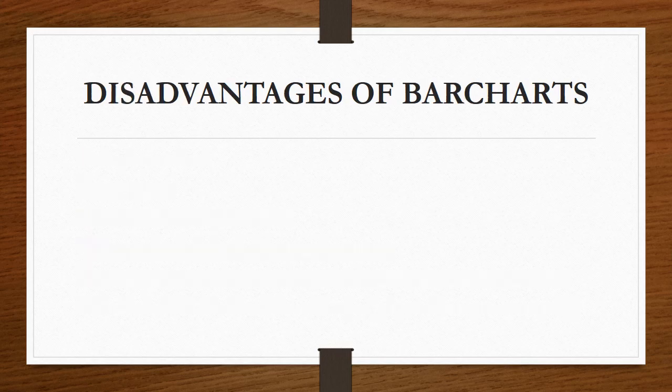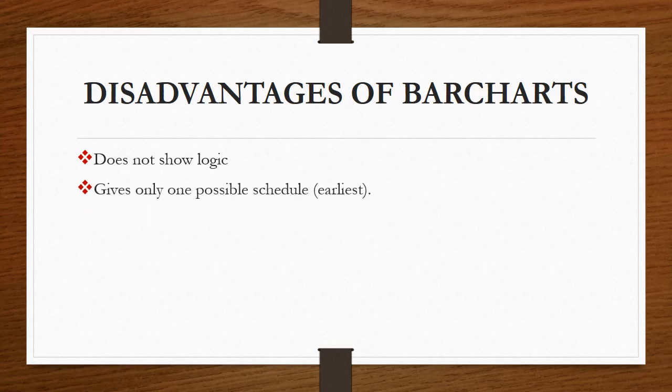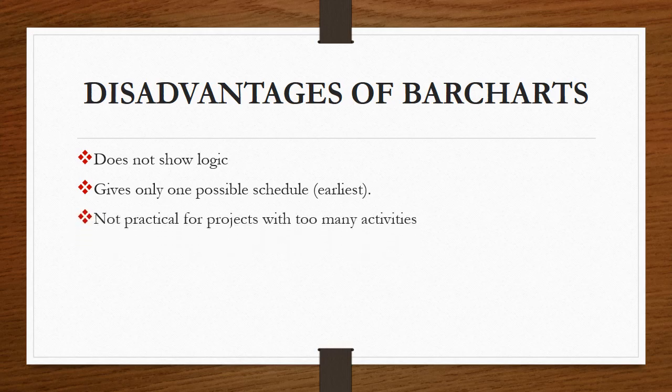Next is the disadvantages of bar charts. The first disadvantage is a bar chart does not show the logic. It gives only one possible schedule. That is the earliest possible schedule is obtained. Not practical for projects with too many activities. This bar chart is not practical for the project with too many activities. It does not show whether the project is behind the schedule. Since it does not show the logical relationship, we cannot predict whether the project is behind the schedule.